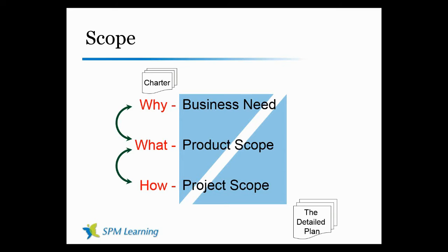And oftentimes we're selecting the product from a straight, you know, hey, this is a cool product, right? But is it really addressing our business need? And when we get down to the project scope is how are we going to create this? Now, do we have all the work we need to create those features and functions? And are those features and functions then hence tying back to the business need? So we call this a traceability matrix.